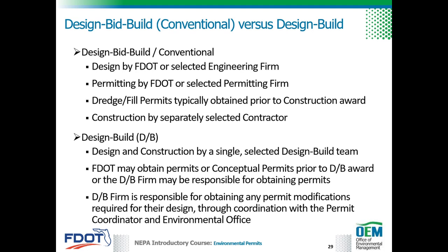Examples of design changes proposed during this process include reducing bridge spans, alternative drainage design, or a change in interchange concepts. During this vetting process, FDOT and the design team must understand which activities the issued permits authorize in relation to stormwater criteria, wetland impacts, and listed species effects, and which design changes would require permit modifications.